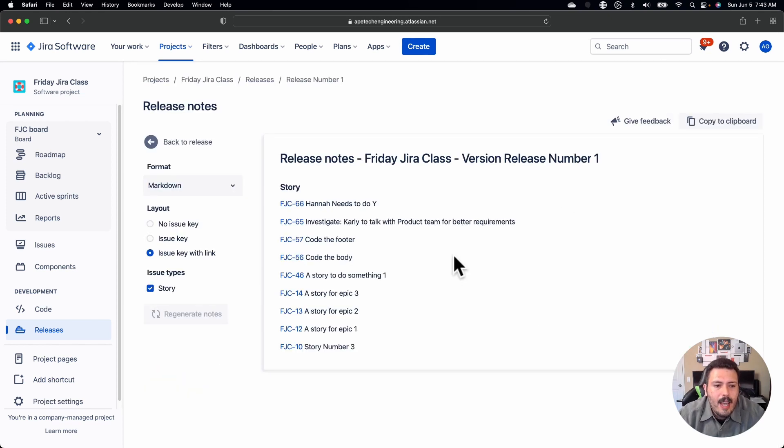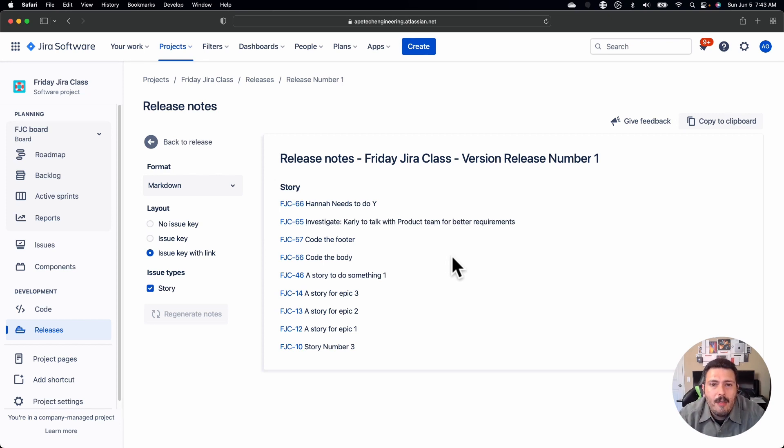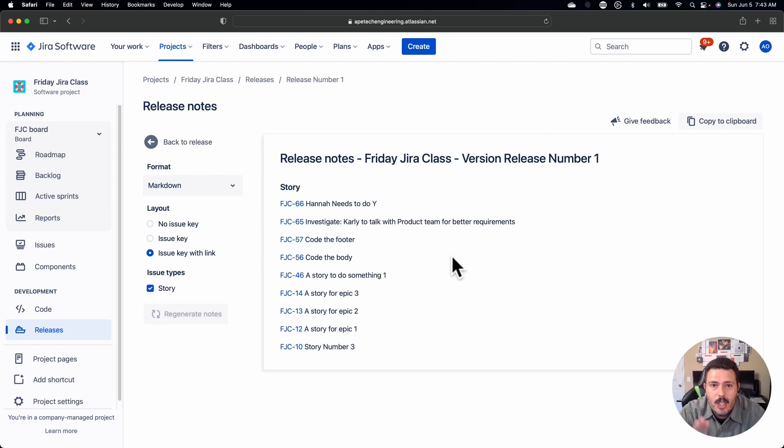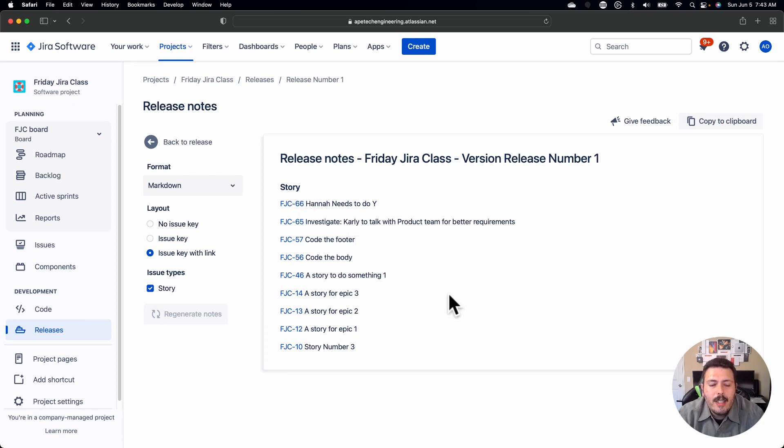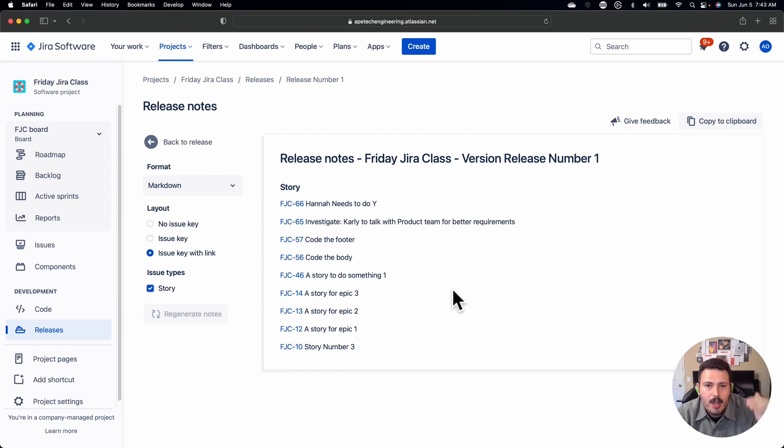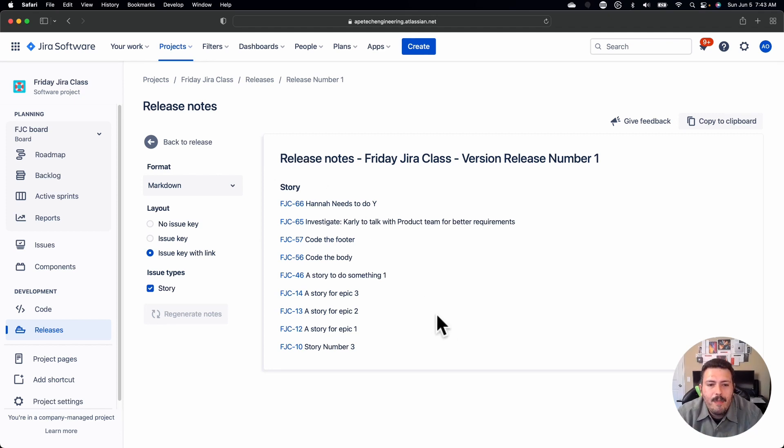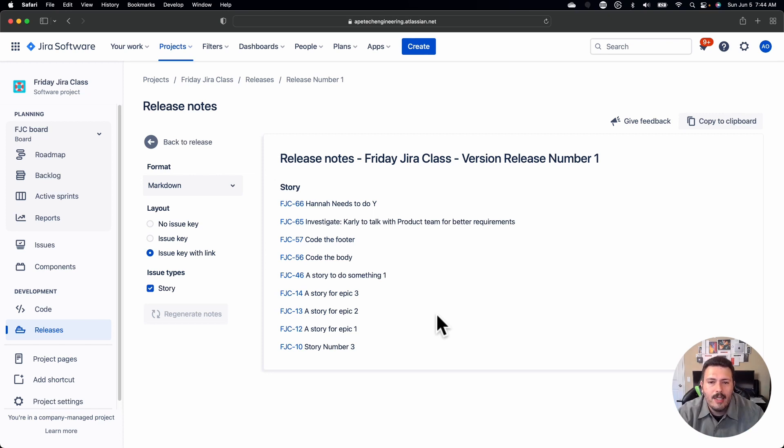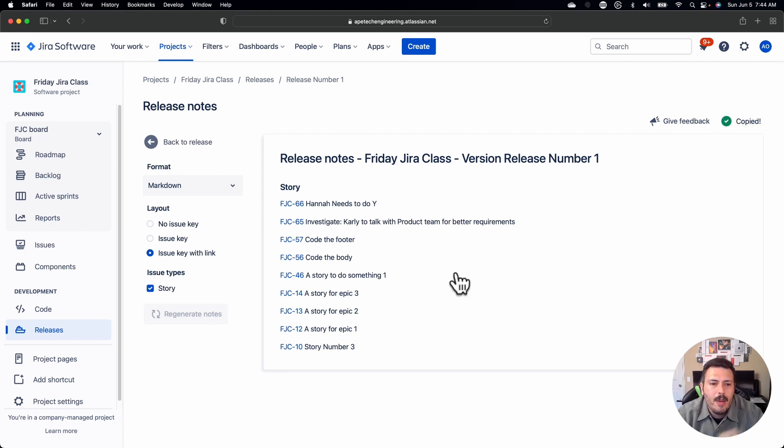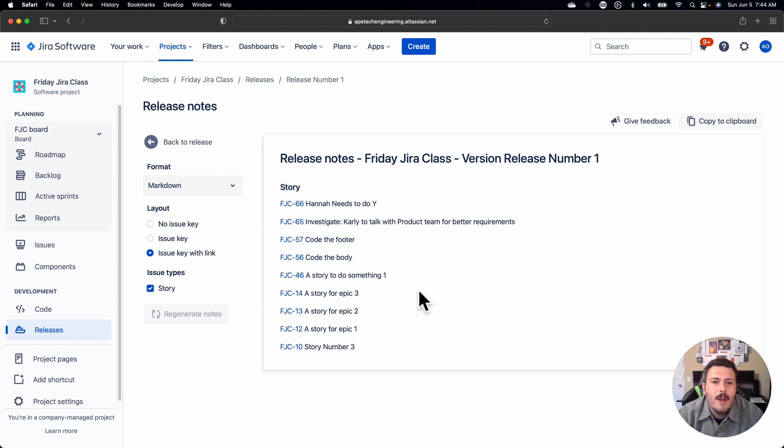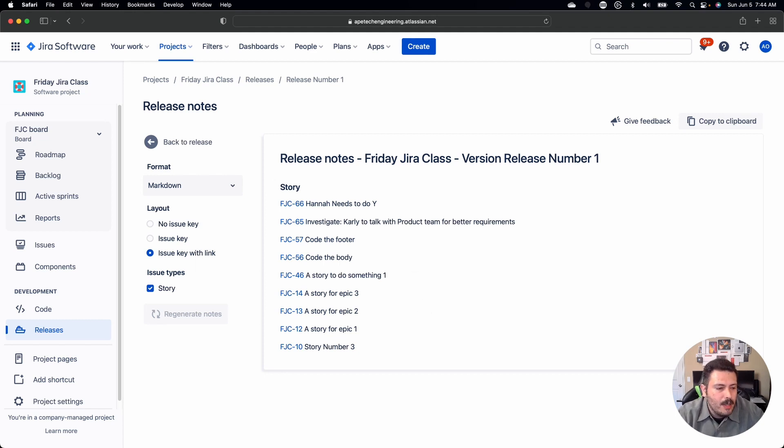The feature I want to show you is that when you are actually working on these releases and you want to basically present everything that went into that release, you do have an option to get release notes here. Now it is very limited and there are some additional plugins. So check out one of my future Friday tools videos, because I am going to be covering a plugin for generating release notes, but out of the box, you do essentially get this summary of all the different issues that went into this release. And so this is whatever issue was flagged with that fixed version equals this one here, it'll actually show up here. So make sure if you want to communicate very easily or you want a summary of what all went into this release that we're about to ship to our customers, you can come in here and Jira will give you, you can copy it, put it in a word document. You can put it wherever you want to do and then just send it out to your customer. So that is feature number seven.